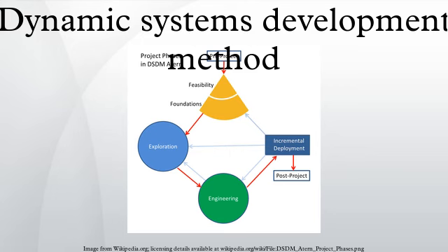The main criteria for acceptance of a deliverable is delivering a system that addresses the current business needs. Delivering a perfect system which addresses all possible business needs is less important than focusing on critical functionalities. Clearly define the scope of the system, understand the true business priorities, establish a sound business case, seek continuous business sponsorship and commitment, guarantee the minimum usable subset of features. 2. Deliver on time. Timebox the work, focus on business priorities, always meet deadlines.